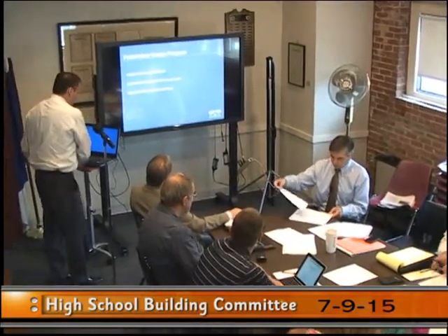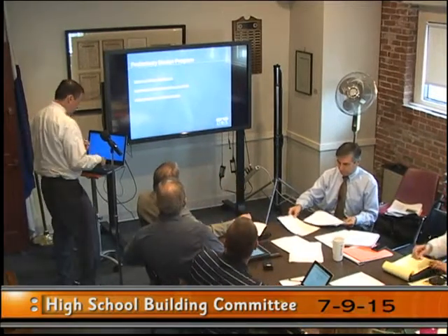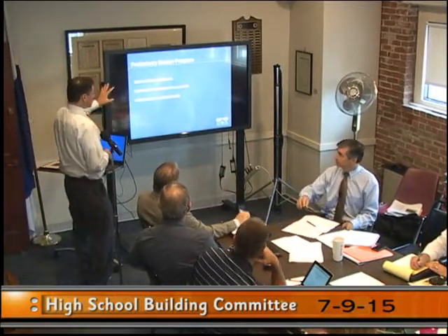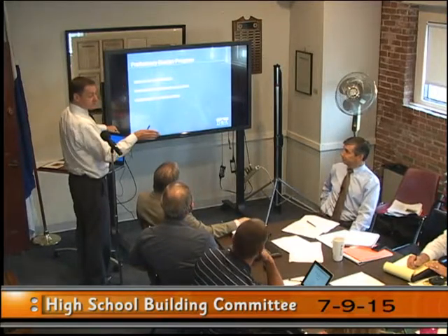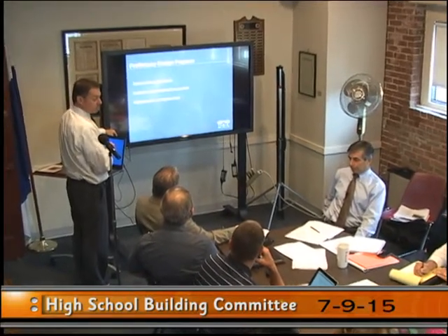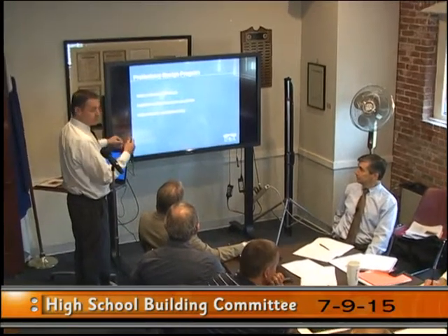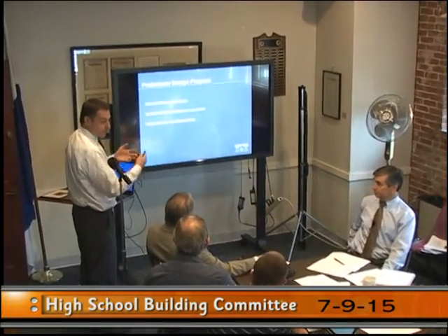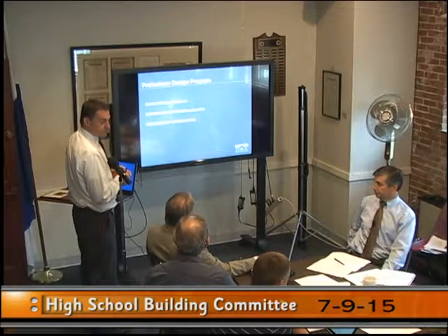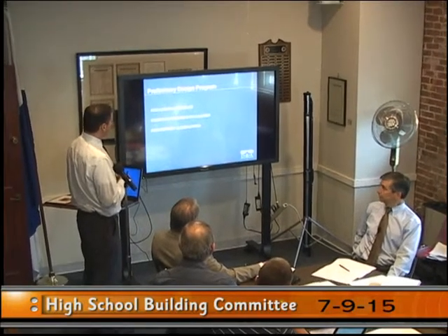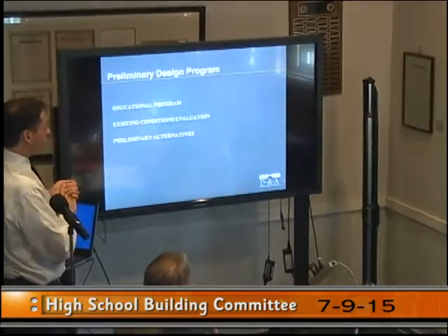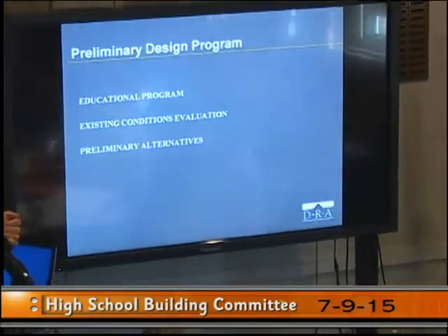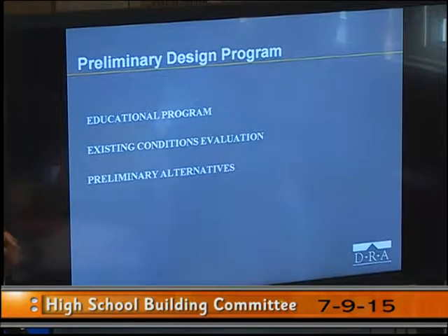Okay, as Carl pointed out, the preliminary design program, our first submission to the MSBA, has these major components. The educational program, which will consist of that space summary that Carl just pointed to, as well as the educational program narrative, the diagrams, the results of our visioning sessions, all of that information related to the educational program. The existing conditions evaluation is a pretty thorough part of the volume, the submission.